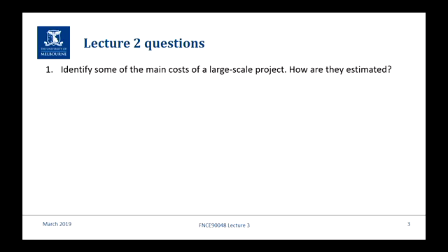So, essentially paraphrasing what we went through last week, you need to identify the main cost categories, and once you've got the main cost categories, you have to determine the breakdown of costs within those categories. So how do you do it? Well, once you've decided what the categories are, that I need oil platforms and drilling rigs, I need pipelines, I need offshore structures, I need onshore structures, which are the production facilities and the storage facilities and the waste disposal facilities and the export facilities. Once you've got all of those things, you then need to determine all the costings within those categories.